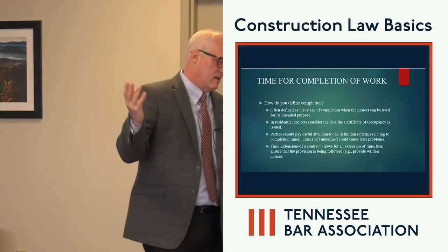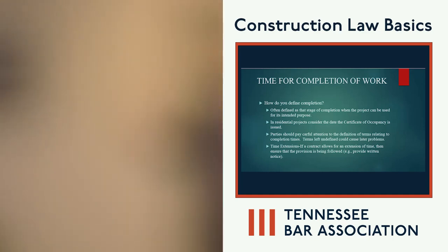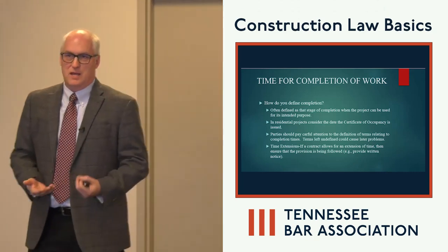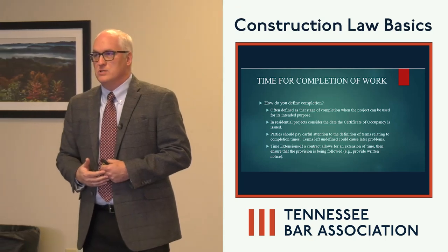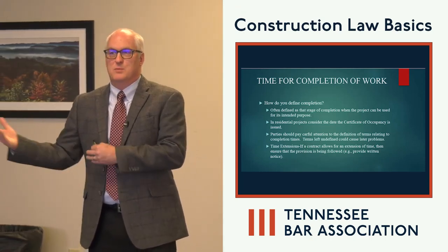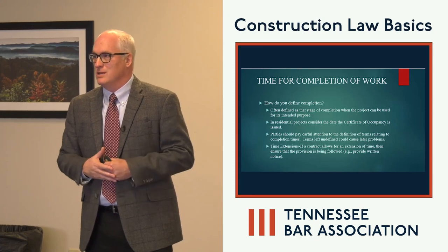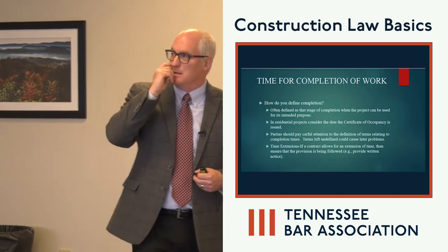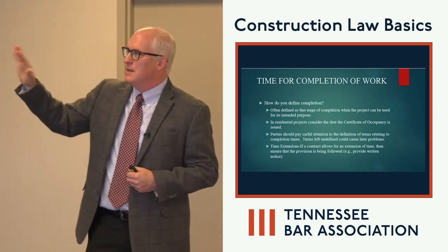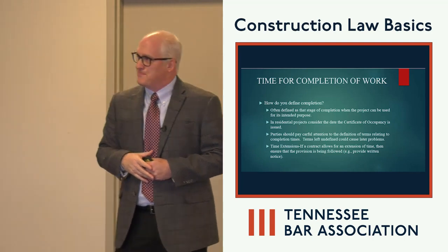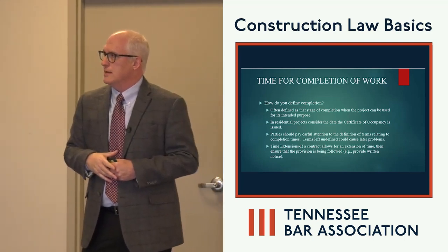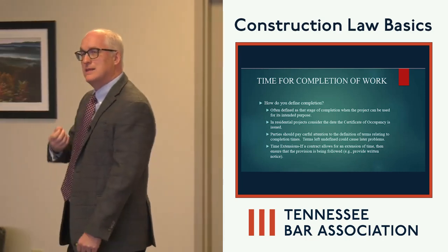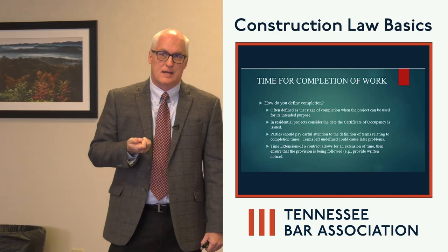Jerry talked a little bit about this. If you've got an owner that's building a hotel and the interior rooms are finished and they can actually allow folks in to sleep overnight, that's the intended purpose. That's what a hotel is, but that doesn't necessarily mean, if the landscaping's not finished, the lobby's not finished, the restaurant's not finished, that it's actually substantially completed. So again, that's another fertile ground for litigation as well.